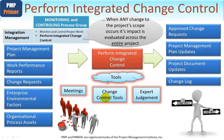Change control tools are often some form of information system, as the flow of changes may be quite complex. It may be something as simple as a spreadsheet, where the true status of all changes helps the change control board avoid being overwhelmed by information. I remember one particular project back in the 80s where a complete rethink was done on the way a particular product was to be manufactured, which had major implications on the structure and functionality of the product. We would have a change coming in from America on a Tuesday, and on Thursday afternoon we'd have a change to the change that was issued on Tuesday. With that sort of environment, it can very quickly overwhelm anyone trying to remain in control, let alone the project manager. So change control tools and systems are quite important here.